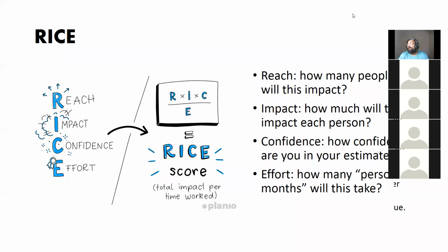How confident are we that we can finish this within the estimate that we are providing, which is nothing but your time criticality. A little bit, it's a linked one. What is the effort that we need to put? RICE clearly says reach into impact into confidence divided by the effort. The higher the number, go ahead with it as first priority. That's all about RICE.